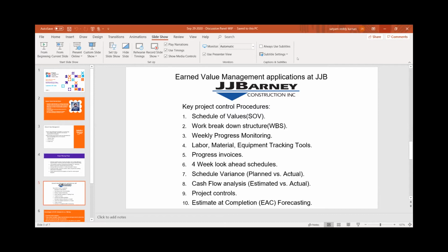On the interiors, I have earned 12,796. On the whole, that's my total for this excavation backfill activity. I have finished 20% of my work. Similarly, for my exterior grade beams, I will have a schedule of value activity and the linear feet, and that's how we do it.